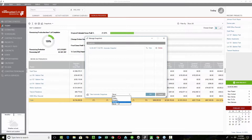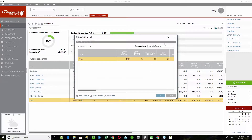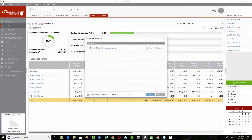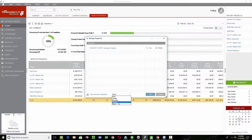My recommendation is to set snapshots to run every month, so at the beginning of each month you'll get a snapshot of where you stood the prior month. Different companies have different requirements for billing — some get all bills in and pay them by the 10th of every month, some put bills in as soon as they get them, others pay quarterly. The beauty of snapshots is that at any given point you can open up and view an old snapshot to compare where you are now to where you were at a specific date.